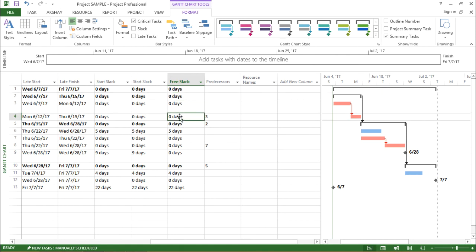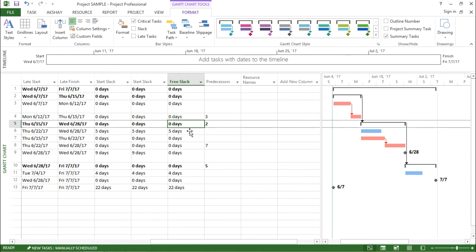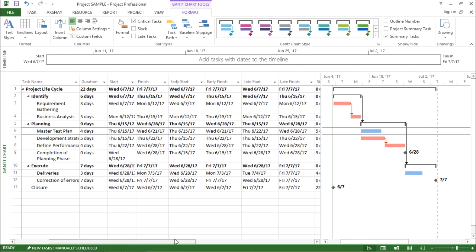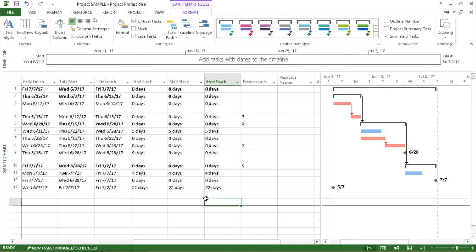Free Slack also has the same property that for critical tasks, the Free Slack is always zero. If you see again for Master Test Plan, the Free Slack will be five days as per the definition.